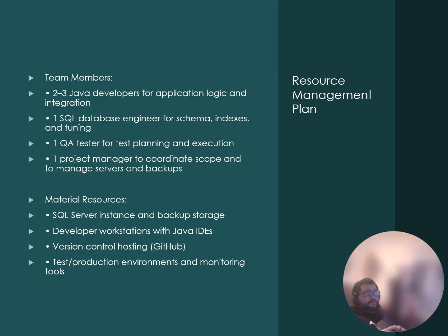So, as far as what we would need to accomplish this development program, we would need at least 2 to 3 people. So we would need 2 to 3 Java developers, one QA, and one system admin. The system admin can work as the project manager, and then we're gonna need one SQL data engineer.